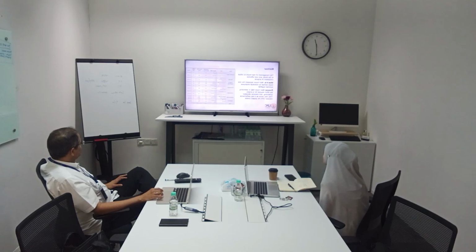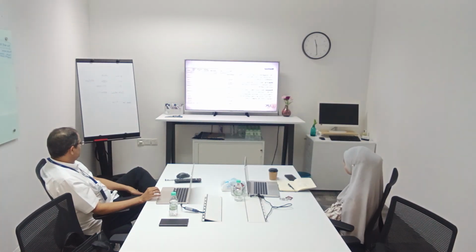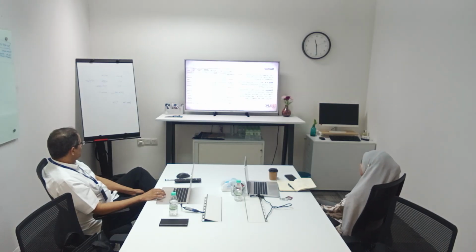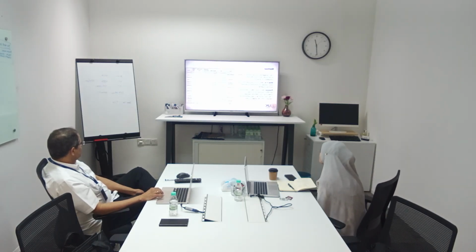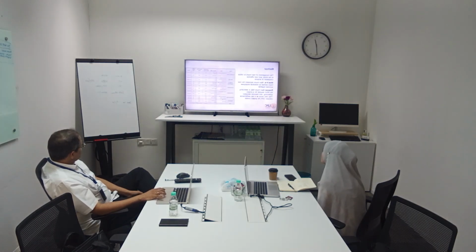This one is not. Nobody. Okay, so all these things is we have total here. Man hour total is supposed to be 4,100. Estimated is on 4,000, but we still have tasks not being performed yet, which is 220, right? So 220, if you add this one, will be 4270. So far from that. So here we have buffer.